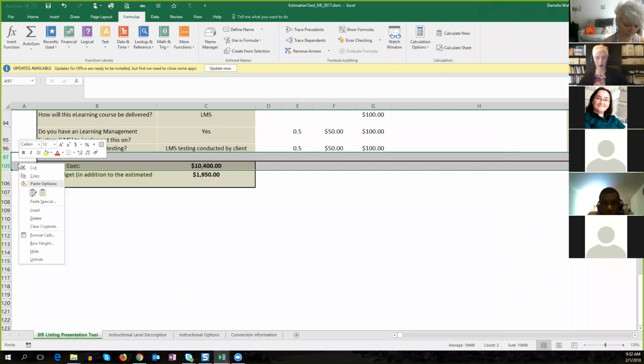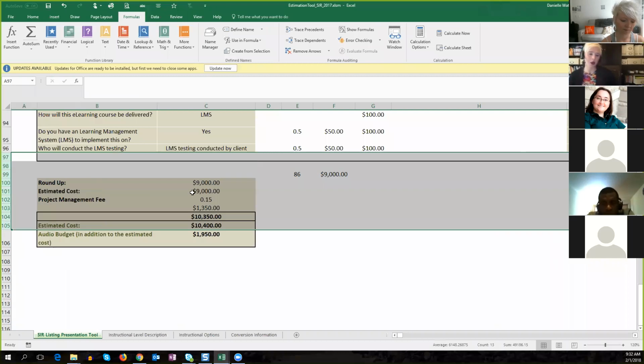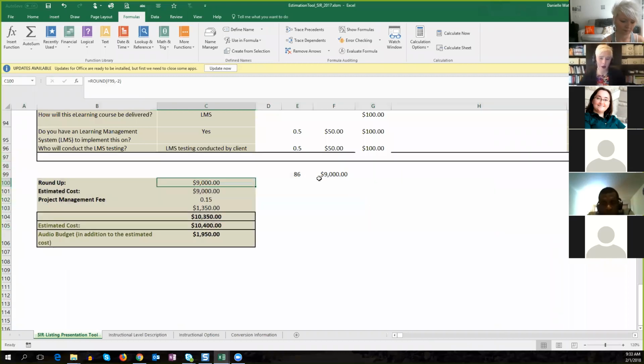And where am I at with time? Okay, so let me unhide these guys. First of all, it takes the total amount and rounds it up. I take the hours and just round them up because it's the easiest way to do it. And you know, this is an art, not a science. It truly is. Then I add a project management fee. That's usually my time. That's setting up the project in Basecamp, the weekly status calls, all that stuff. And then they get the total price.